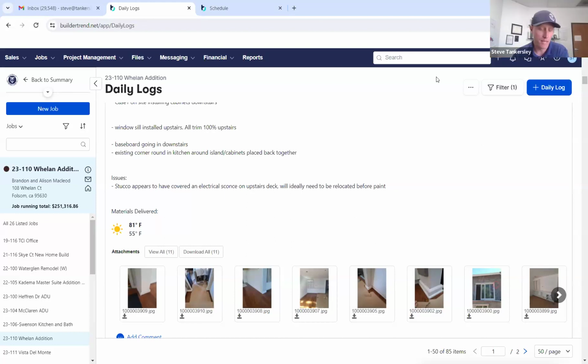The biggest savings is really just not running around town to every single job. So number one, I know how jobs are running. Number two, the sales process. That's my biggest chunk of time. You also save time by setting up job walks with trade partners and sending invitations to bid, saying, hey, we have a job walk from 9 to 12, and this is how it's staged. Instead of meeting my stucco sub and then my electrician the next day, which is disjointed, we can consolidate those and save that time.